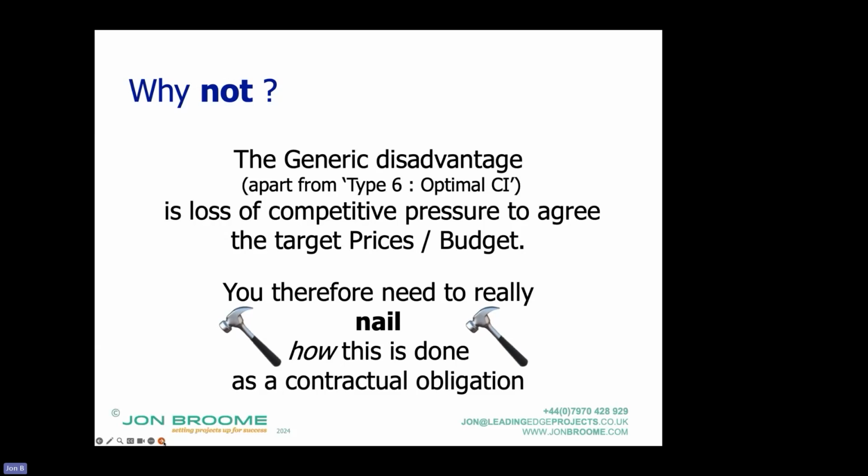If you're going to appoint a contractor basically on consultancy rates and a fee percentage, you really need to nail down, as I think Moji was probably getting at, how you're going to agree those prices. How are you going to price for the risks? What are you expecting to see? What's the process going to be? Not to the nth level of detail necessarily, but sufficient detail that you're going to have comfort.